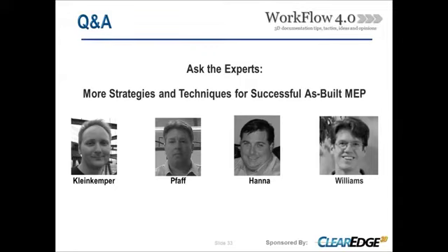But overall, we're probably getting about 20 to 40 scans with a particular scanner per day. But that's a 12-hour, 14-hour day also. Yeah, if I could just expand on that, Mike is spot on there. There are so many different factors that play into it.